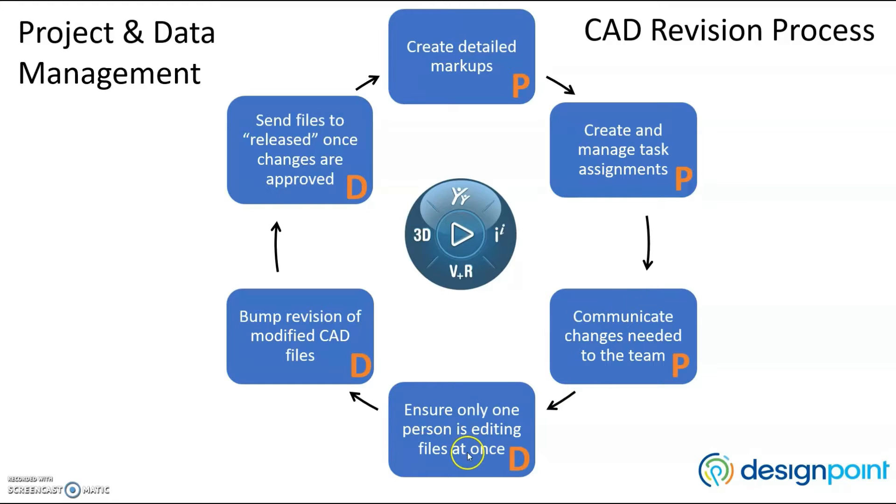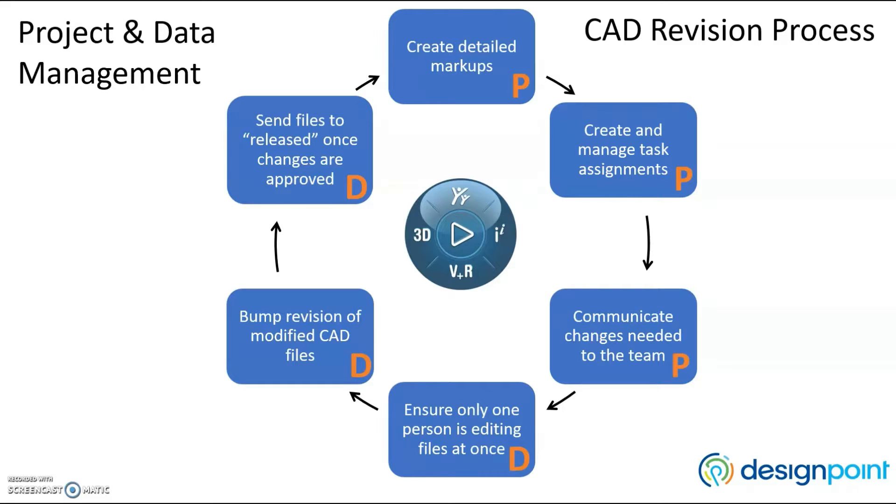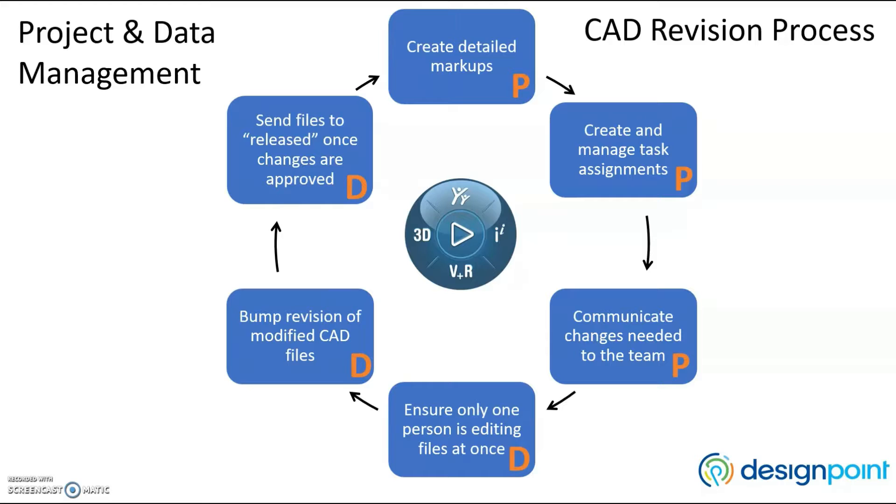The engineer assigned to the task would reserve the CAD files, ensuring the files cannot be edited by anyone else at that time. Once they've made their changes, they'll save and bump the revision of the files. They notify the project manager that they're finished with their changes. And finally, the manager sends the CAD files to released once they approve the changes.